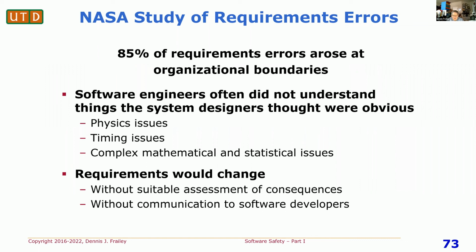you only have to do one thing, General. Anytime anybody changes a requirement, you have to get a signed document from me telling you what will be the consequences of this change on the project schedule and cost.